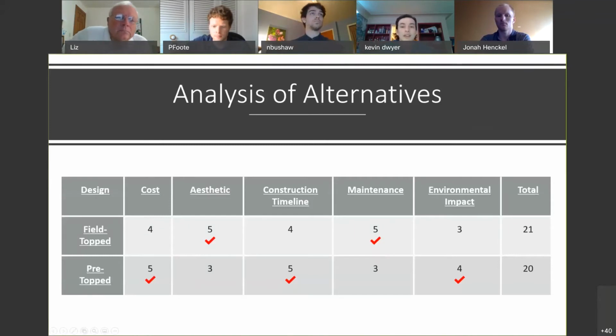So when analyzing our alternatives, we looked into 5 main categories, using different articles and resources, as well as conversations with different professionals, such as our sponsor, Greg Emke, and came up with this data here. We decided that the pre-topped was more cost efficient because the entire T-beam is manufactured at once and you're not pouring a large amount of concrete on site.